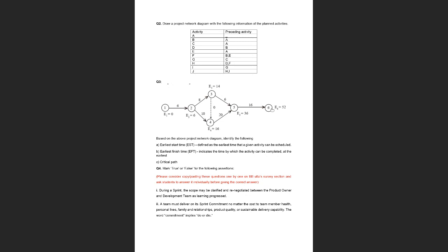36. Yes, 36. Let us calculate all the duration here. So it is 6 plus 8, 6, 12, 12 plus 8, 20. So we have 20 coming in from here. But from here we have 20 plus 10 plus 6, 36.